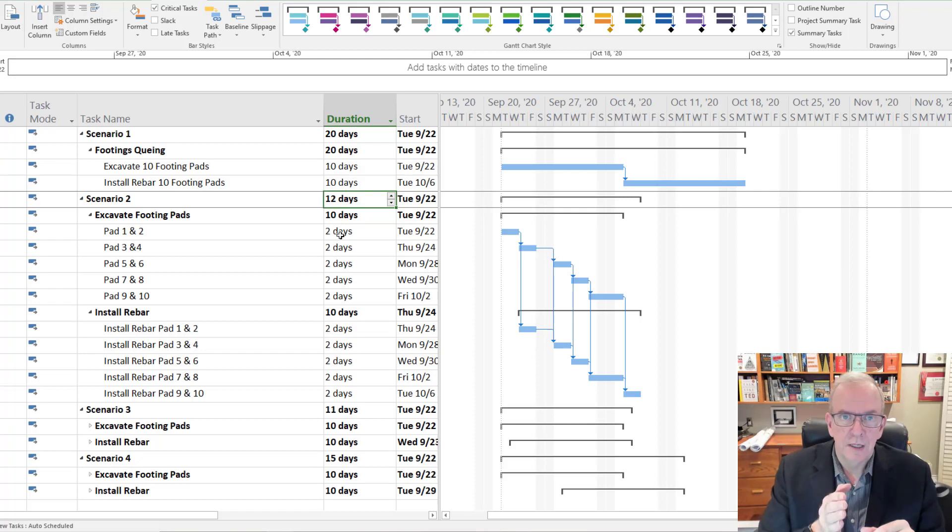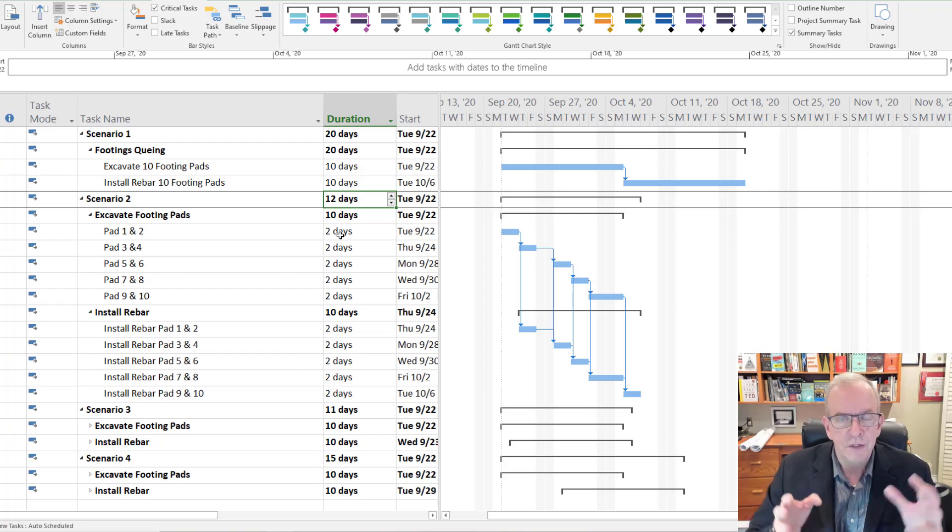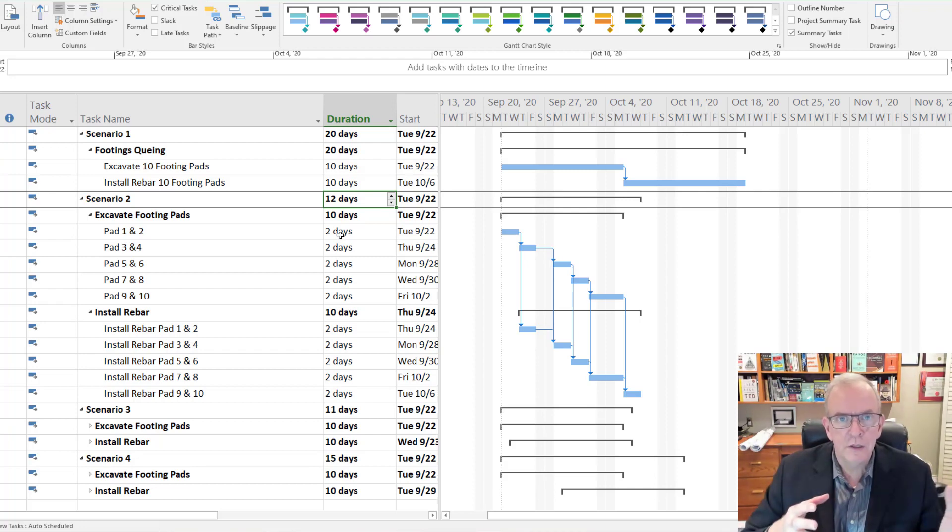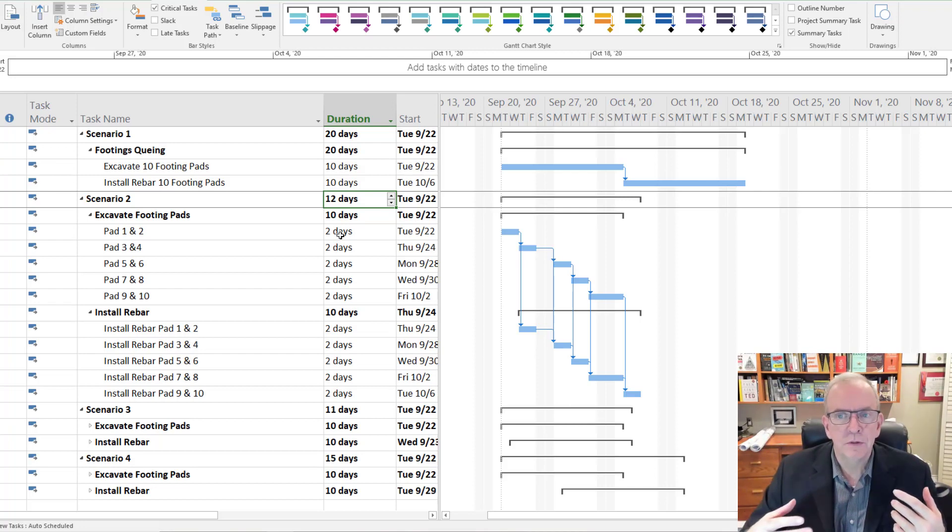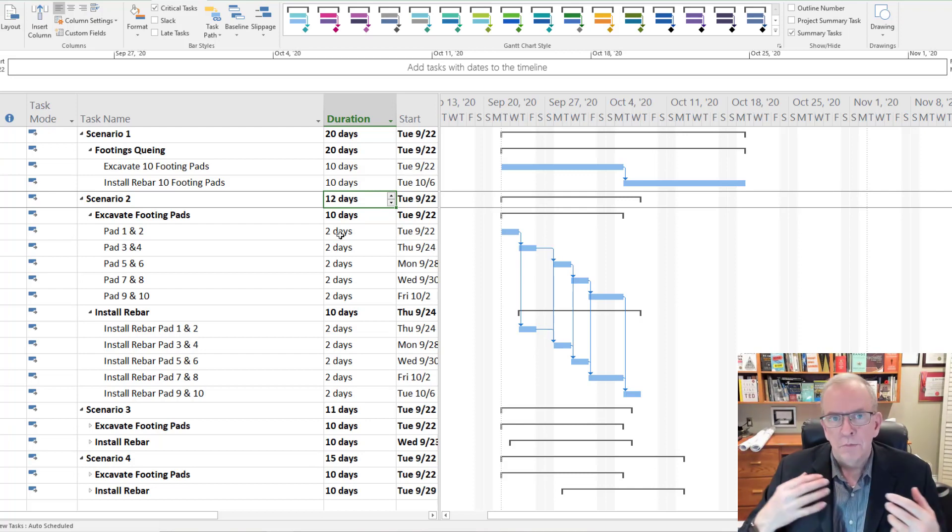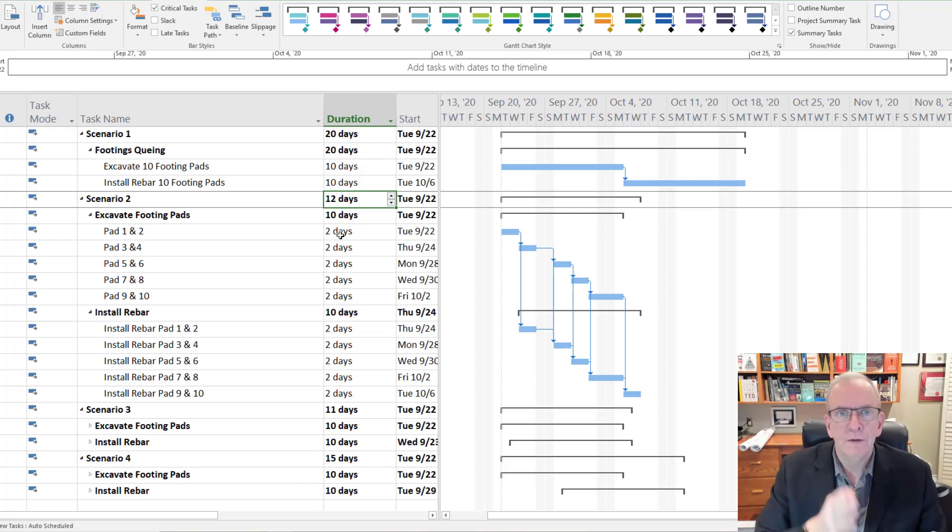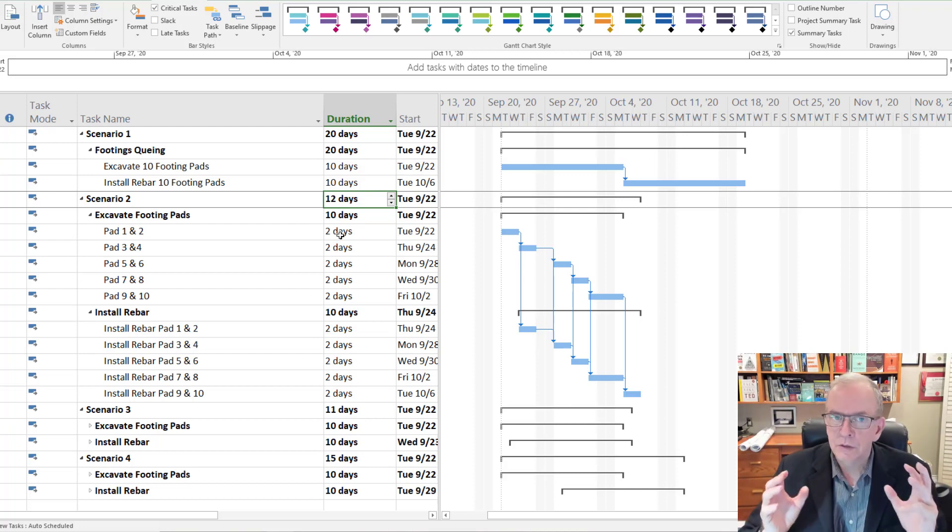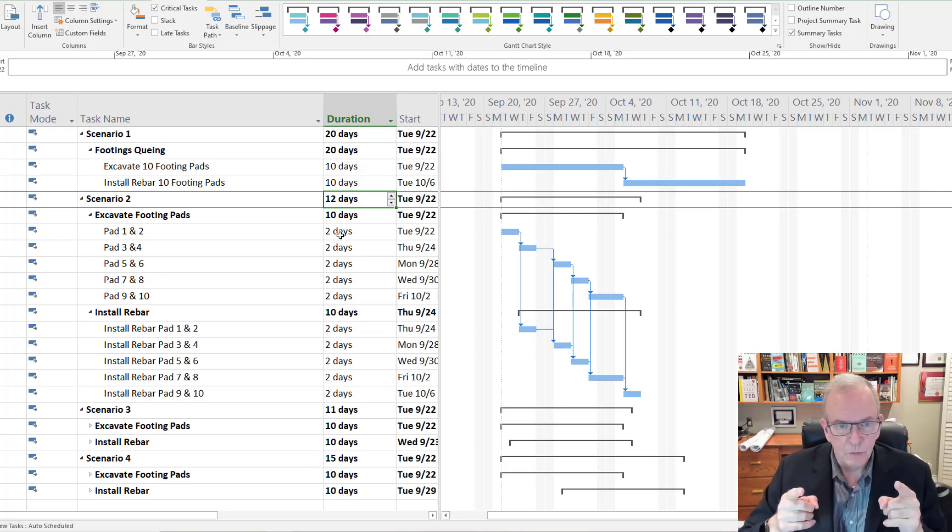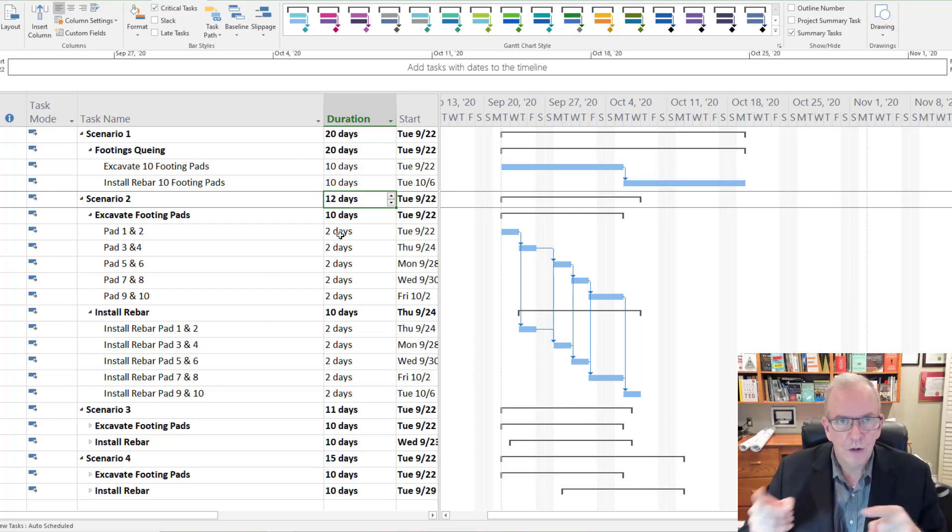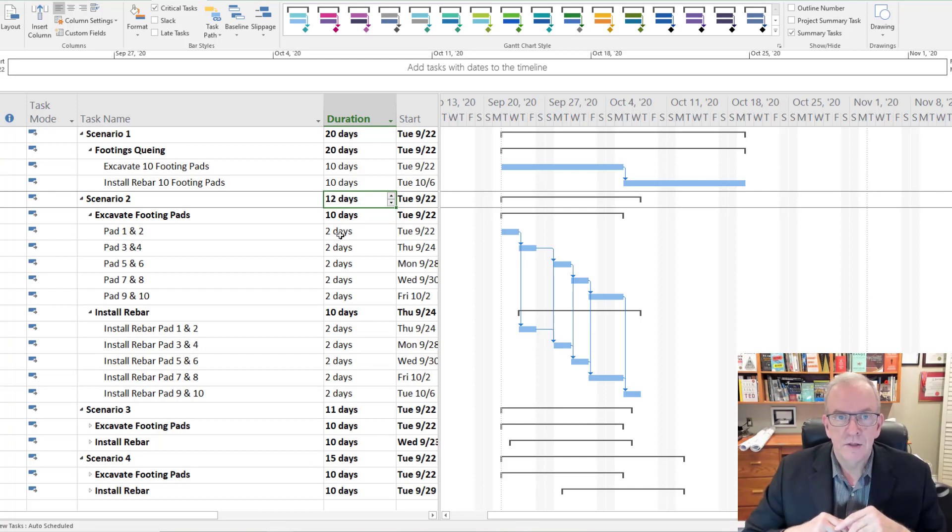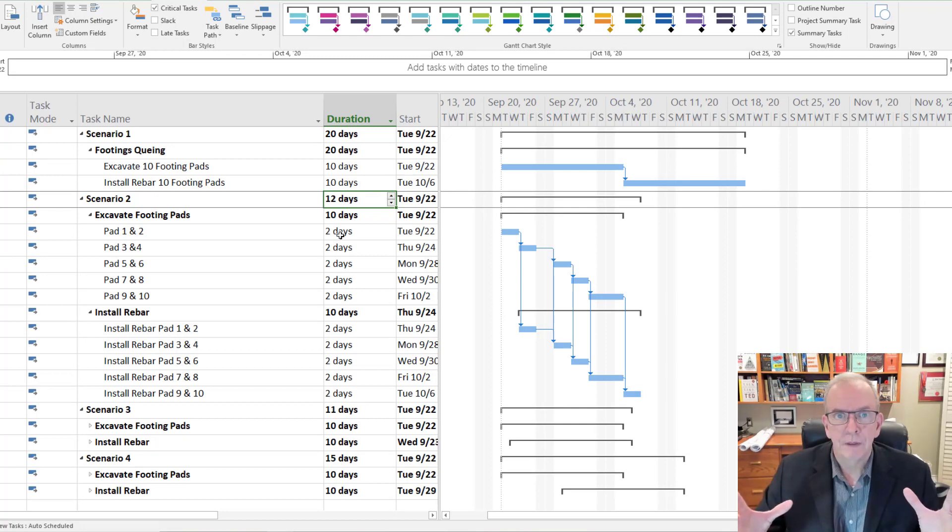We have the overhead cost, the project overhead cost, the company overhead cost, the opportunity costs of the project. Every day that you're on a project, there's a per diem cost for you being on that project. If it's a big project, you might have trailers, the project infrastructure that's built up, an admin staff, a project manager, a site super, project coordinators, administrative staff. So there's a pretty big cost. We're going from 20 days to 12 days. On a bigger project, you might be going from 200 days to 120 days. That would be a difference of 80 days.